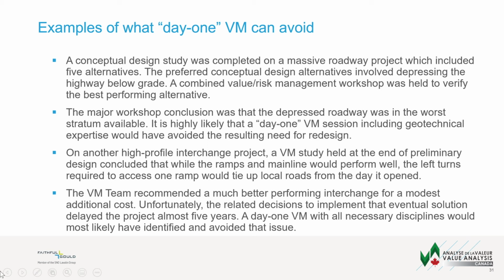redesign. On another high-profile interchange project, a VM study was held at the end of preliminary design and concluded that while the ramps and main line would perform very well, the left turns required to access the on-ramp would tie up local roads from the day it opened. The VE team recommended a much better performing interchange for a modest additional cost. Unfortunately, the related decisions to implement that eventual solution delayed the project almost 5 years. A day one VM with all necessary disciplines would most likely have identified and avoided that issue.